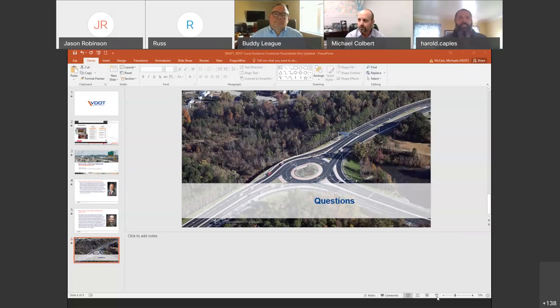Well, I know, Mike and Buddy, too, that we have an interactive system. Buddy, you mentioned the ability to ask and receive answers to questions for clarity purposes as they relate to a proposal or IFB. I know that we utilize a system that anyone can post questions to, and we commit to providing answers up to the Friday prior to the bid submission deadline. We have a very rigid schedule laid out a year in advance from a letting perspective. So, if we have questions by that Friday, we are going to provide some level of effort to provide an answer of some sort, whether it be, hey, it's an error, we missed it, we'll have to work order it, or this is the further clarity that we need.